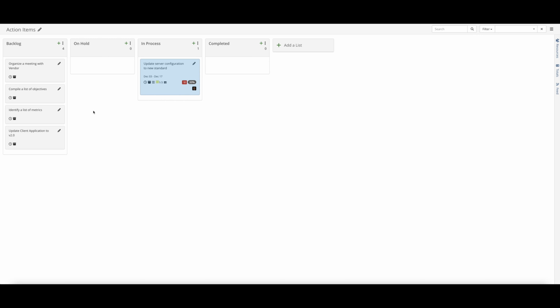The first is a to-do list, and this is where everything that you're planning to do as part of the project can live. And using agile terminology, sometimes we refer to that to-do list as a backlog. The second main column are tasks that are being worked on. So in this case, we'll call that the in-process column. And finally, the best part is when a task is completed, it moves to a completed column.